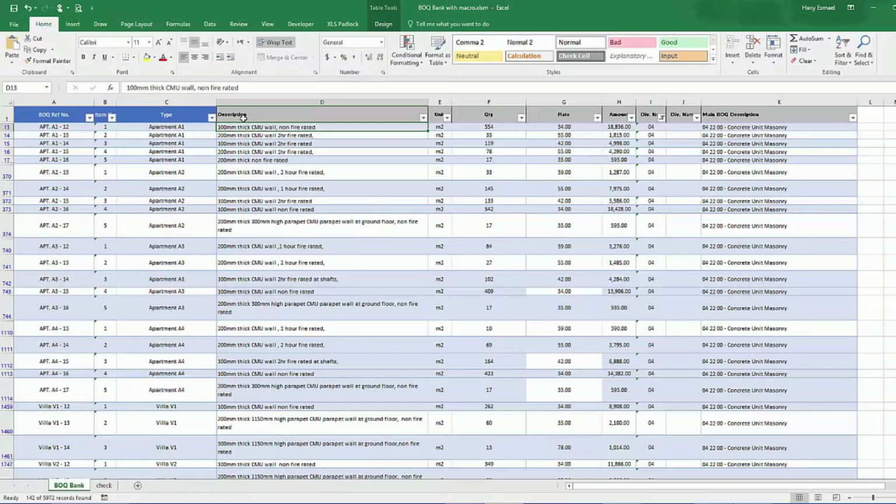So this is the sample I give to you in order to complete the exercise by yourself. So here we have the control ID. This control ID should be the same for the activity. For example, here we have this 3-0, which is related to the plain concrete under slab on grade.